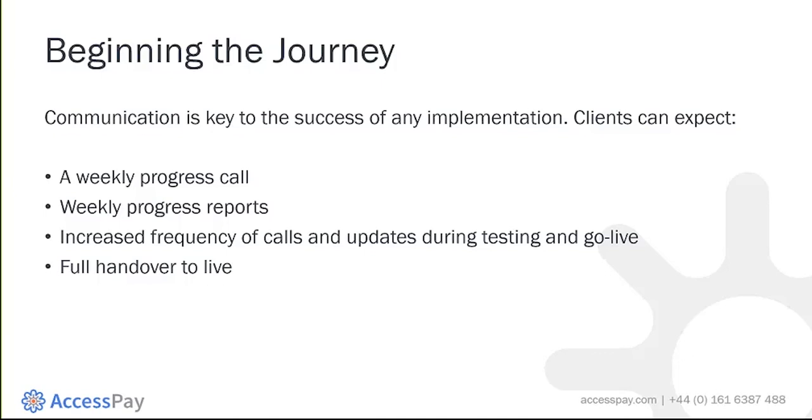Whilst working through the project process, there may be times where we need to increase the frequency of calls and updates, and the main period where this comes into play is during testing and go live. We often find that the testing stage can be very labour intensive for the customer. So what we like to do is have a call in the morning to plan the day's activities and what we hope to achieve, and at the end of the day we can have an update just to see if we have met those targets and what the next steps are. And once we have finished our testing, the next stage would be to have a full handover to live support and our service delivery team.